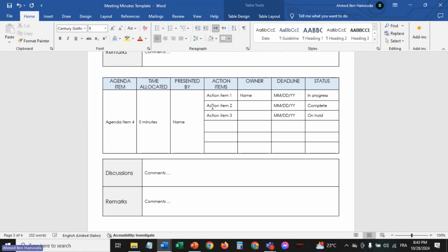So usually, since the kickoff meeting of the project, and in the early meetings, I tell them in advance, this is part of my communications management plan. I send you the meeting notes or the meeting minutes no later than 24 hours after the meeting.